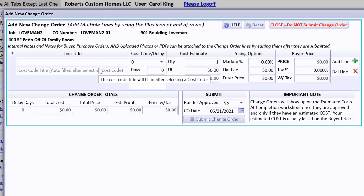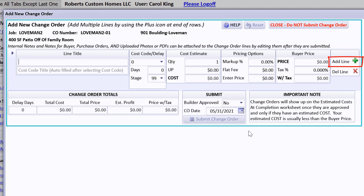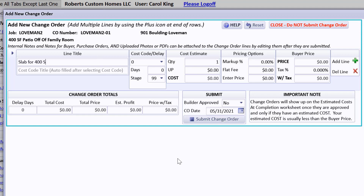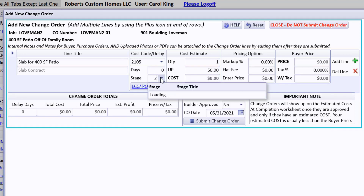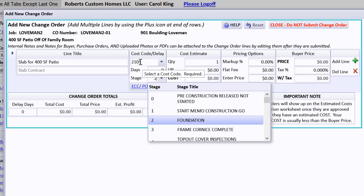The change order opens to enter the first line. For a patio, I'll need four lines: one for the slab, one for framing labor, one for framing materials, and one for the roof. We need to allocate costs to the right cost centers on the ECC worksheet. Starting with the slab for the 400 square foot patio, I'll choose the slab contract cost code — Stage 2 (Foundation Stage) drops in automatically. It's decided this will take two days. I'll look up the ECC info: Glenn at Big Buck agreed to $11.50 per slab square foot, so I'll use a quantity of 400 and unit price of $11.50, giving an estimated cost of $4,600.